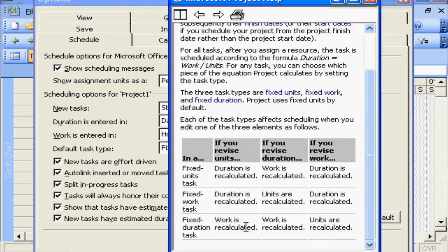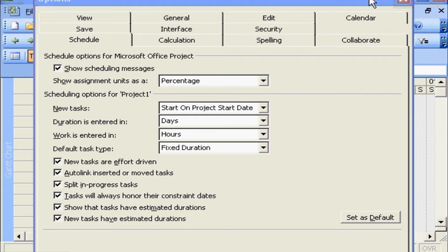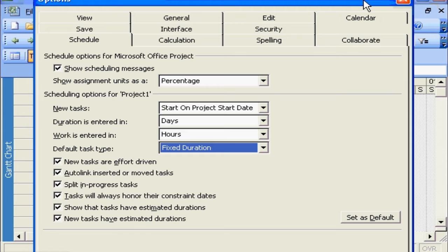It's critical that you understand these differences, but the shortcut answer is all tasks created in Microsoft Project that you are going to effectively manage need to be set as fixed work. In essence, that says the effort for this task, 16 hours, 24 hours, 36 hours, whatever the estimate for the task that you have defined in estimating is the actual work that will be required to complete the task.